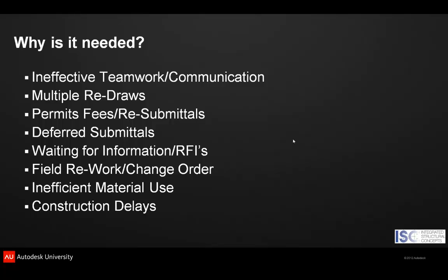RFIs take up enormous resources for the trades and suppliers who have to generate them, as well as the responding parties and the general contractors who have to organize them and make sure they are followed up on. Rework and change orders cause exponential losses, including loan expense and rent revenue lost due to construction delays.